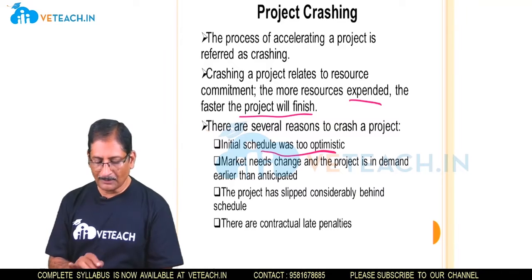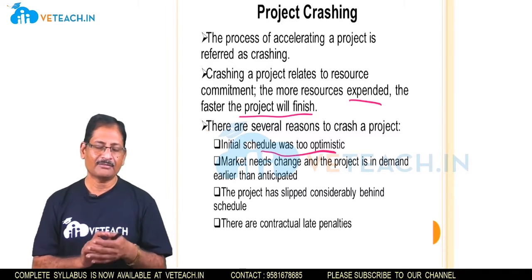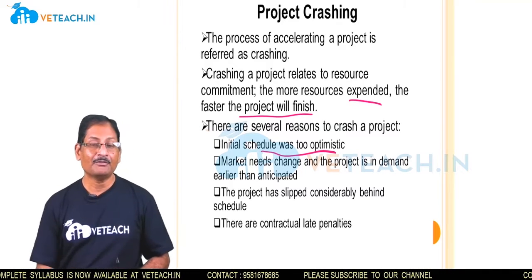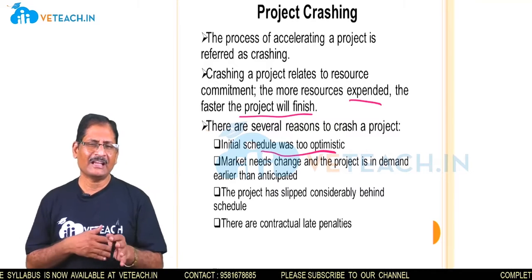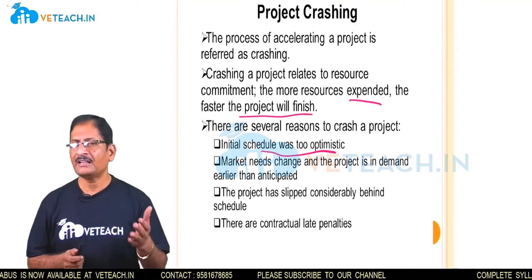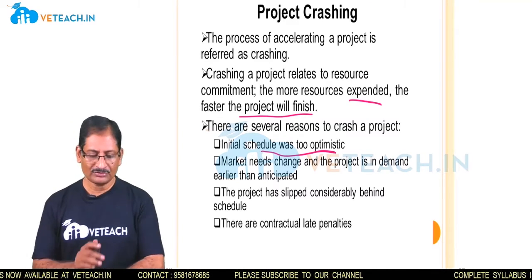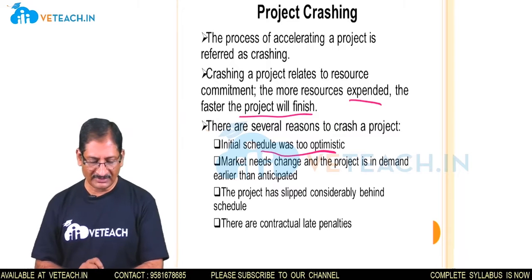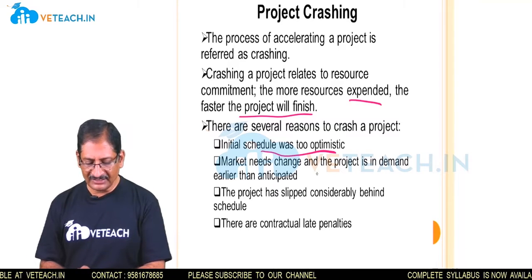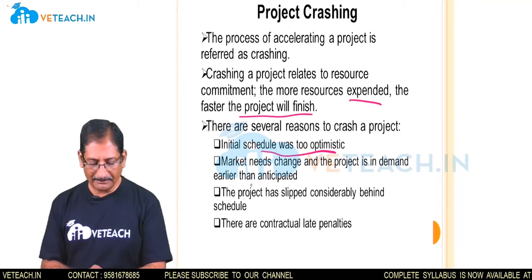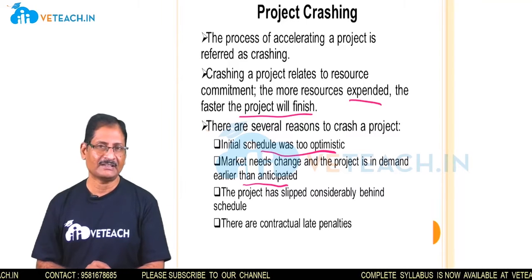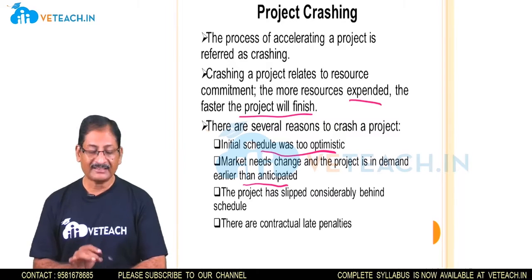Initial schedule was too optimistic, meaning earlier while we were planning this particular project, we were too optimistic, taking everything on a positive side, but in reality that may not happen. So in such kinds of situations we have to go for crashing. Then market needs change and the project is in demand earlier than anticipated.